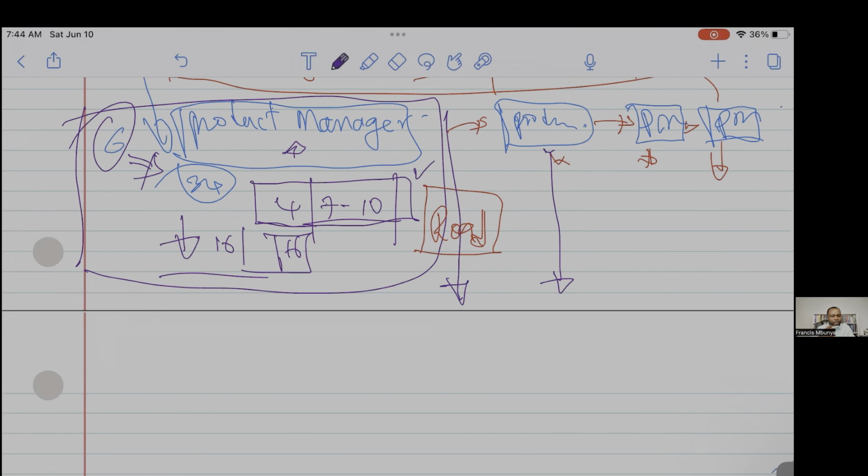If a product manager is working on a product that cannot deliver end-to-end, what's going to happen? Now they need to be able to partner with another team to have a full value stream. Now, if they don't do this, what's going to happen? If, let's say, we have a product, which is a login hub, and we section it across 2 product managers, what's going to happen? A lot of interdependency, and that becomes an impediment in the process of the project.